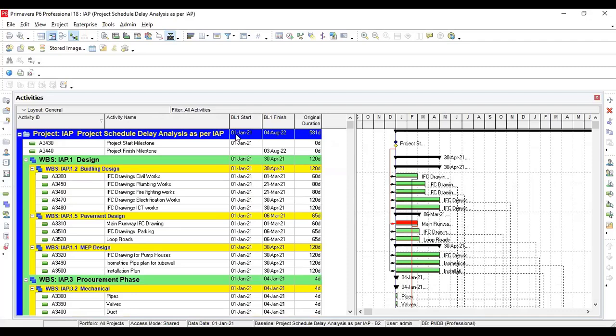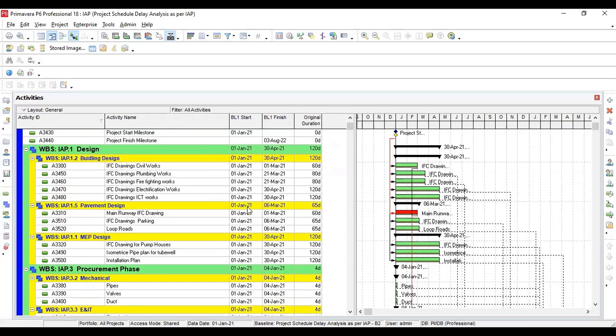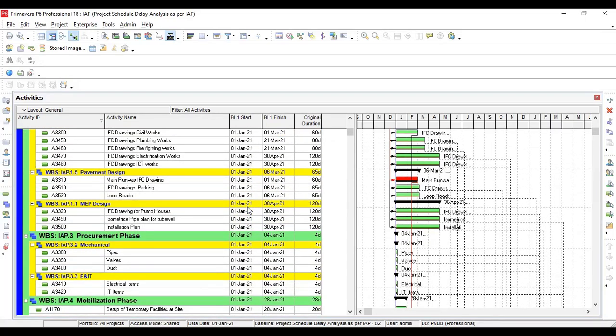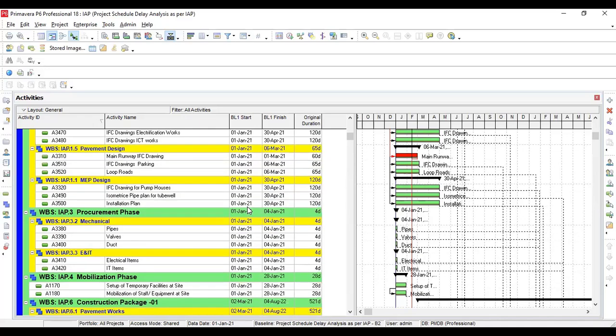This project is going to start from first of January 2021 and is 581 days. This is actually the baseline, and we are going to study the things keeping in mind what is our project management standards when we are going to apply delay analysis for EOT or cost claims using this specific technique.